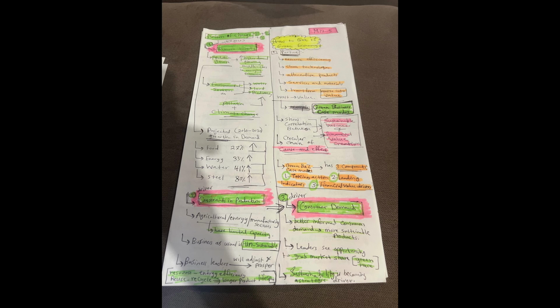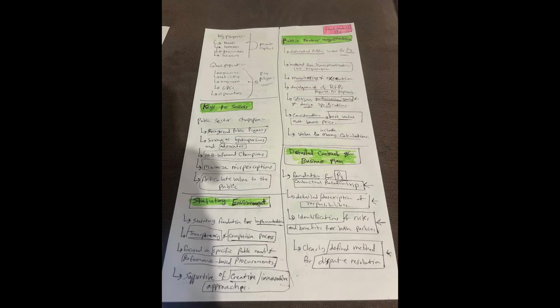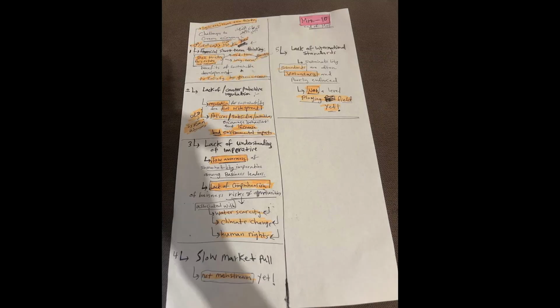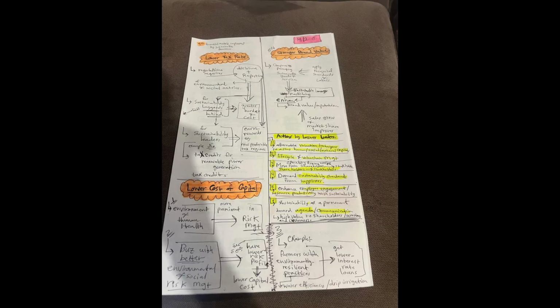Now, benefits and costs over time, this is where present value comes in. Absolutely critical. You can't just add up dollars received or spent in different years. You need to discount future values back to today's terms using the present value (PV) formula. PV equals FV_N over (1 plus r)^N for a single amount, or the sum of FV_i over (1 plus r)^i for a stream over N years using a discount rate r.